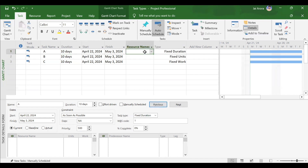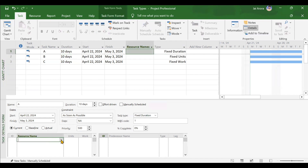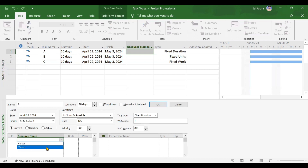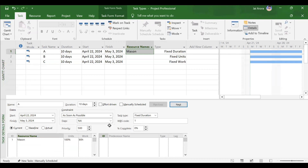For units, consider an example: assigning one Mason resource to a task automatically shows 100% in units. Converting 100% to an integer gives 1; 200% gives 2. So units basically describe the number of resources. If it is 700%, that means 7 of that resource are assigned.